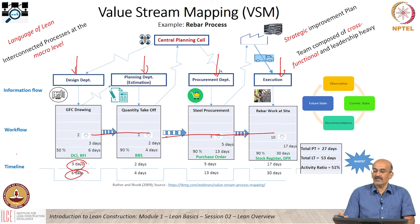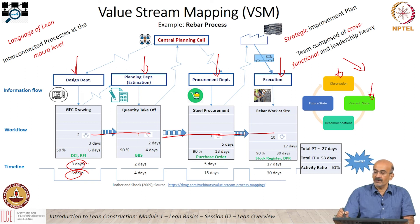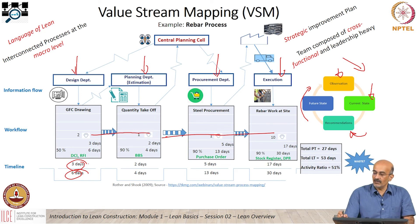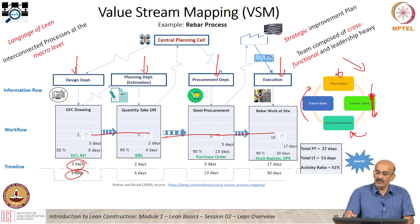To develop a value stream map, there are four phases: you do observation on the process, develop the current state map, make recommendations, and then develop a future state map. In this development, we have only reached the current state. We need to make recommendations to improve efficiency and decrease waste — that will be the future state map. Once we implement the future state, we can observe how it performs and then continuously repeat this cycle to keep improving the process.